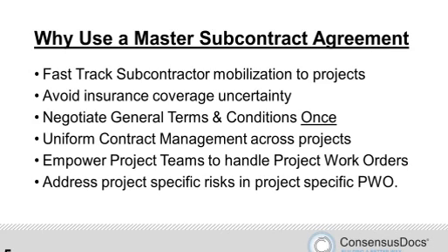And because it is exhibit driven, there's not really a functional need or motivation to do a lot of changing of the substance of the actual project work order language to create conflicts with the master subcontract agreement. So in that sense, the way that it is structured really is a big benefit and improvement over a lot of the project work order notice to proceed documents that I've seen in the past. Right.